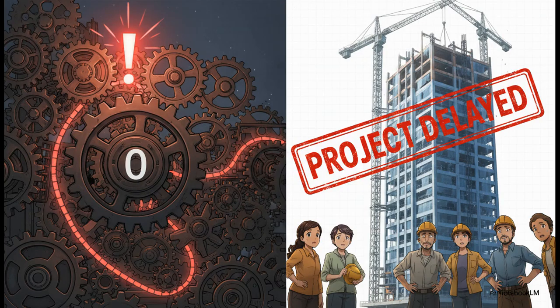If you got that, you've nailed the core concept. A zero float activity is, by its very definition, critical. Any delay there is going to push back your finish date. That is the single most important thing to take away from all this.